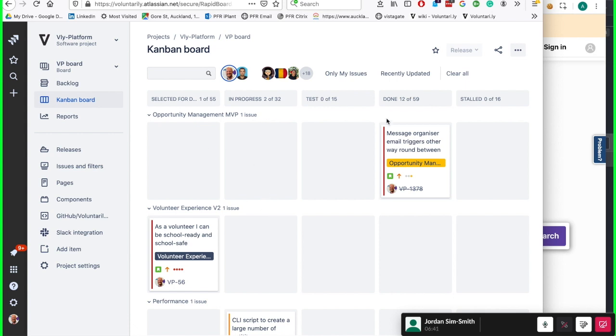The goal with this Kanban style of working is to pick up a ticket and just really keep ramming it forwards until it gets to done before you start something else. When we break down tickets into work, we try to make them small enough that you can actually do that in one session, where a session might be a whole morning or a whole couple of days, depending on your work style. But you really want to be able to do it before you lose track of what you were working on.